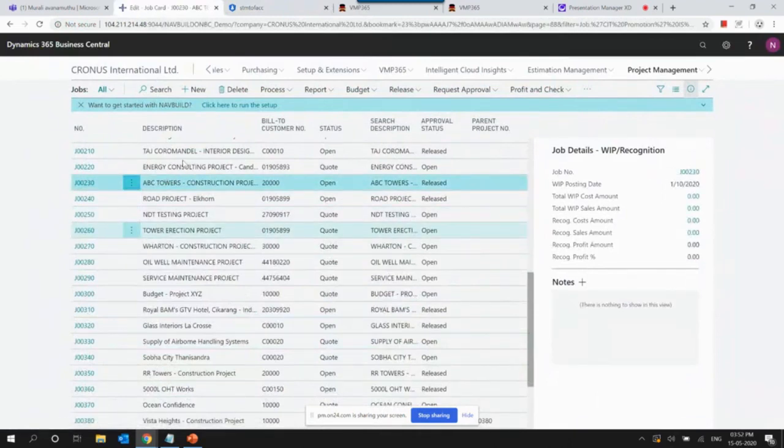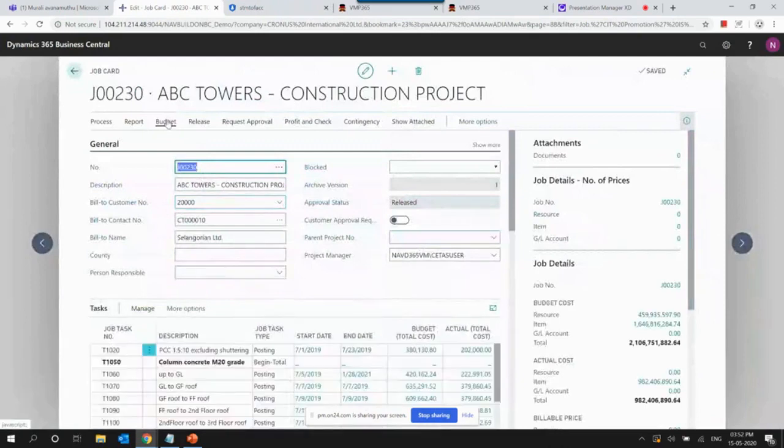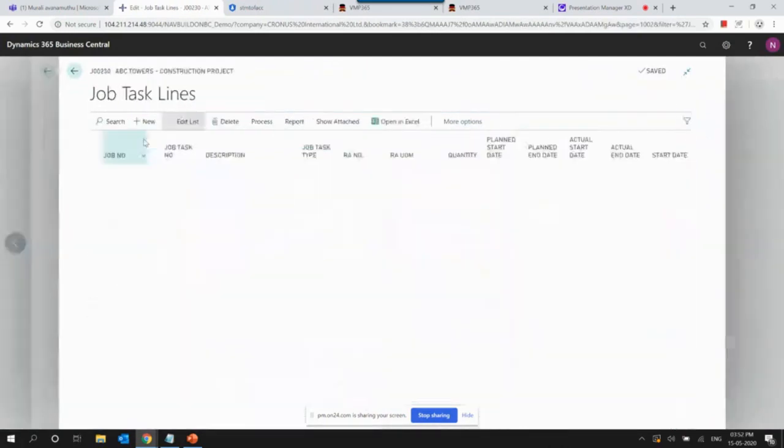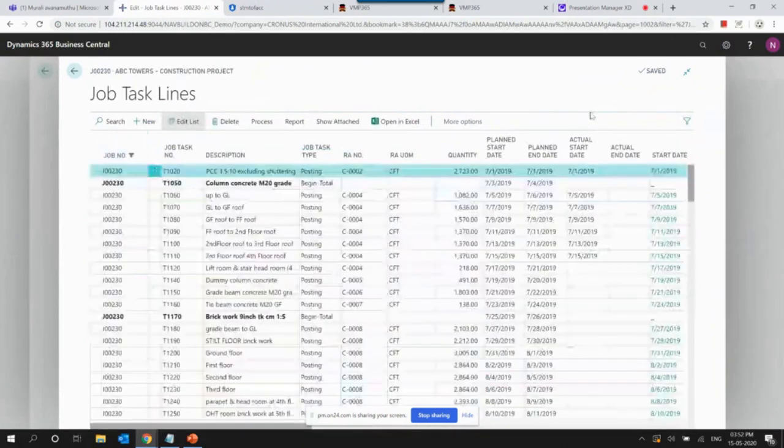Here it will have the project details, and it will also have the project BOQ as per the drawing which we have agreed from the consultant and from our internal management. Here you can define the BOQ either based on blocks or based on floor, or even if you want to classify based on the type of work, that is how we have defined here.